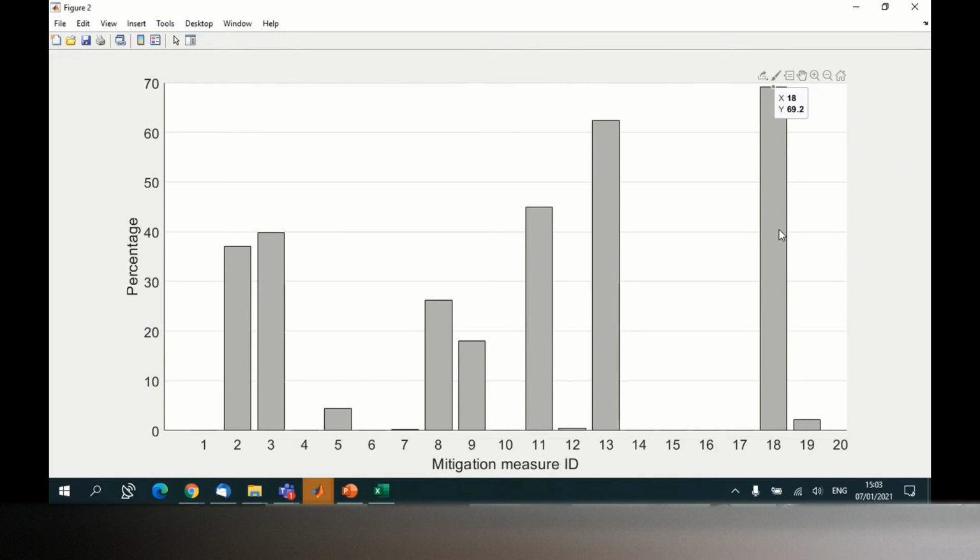So now if you want to make a decision, and if you really want to execute, actually you go to your project and you really want to execute measures, then you would choose this one, right? You would choose this one, and then this one, and then this one. You go according to the criticality, because this criticality gives you the importance of this measure, the effectiveness.